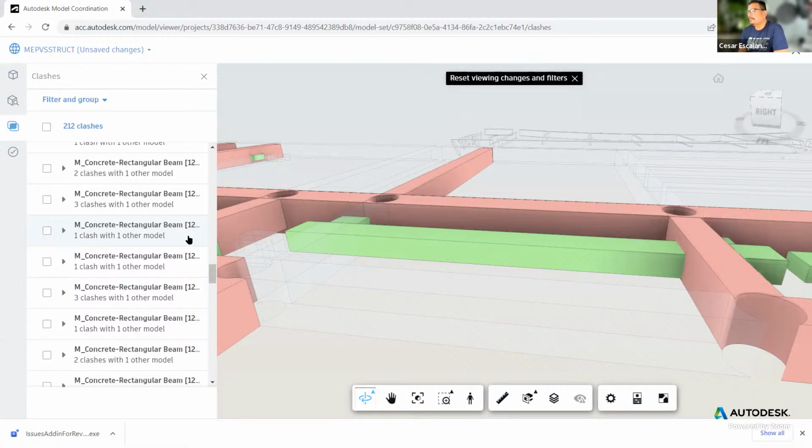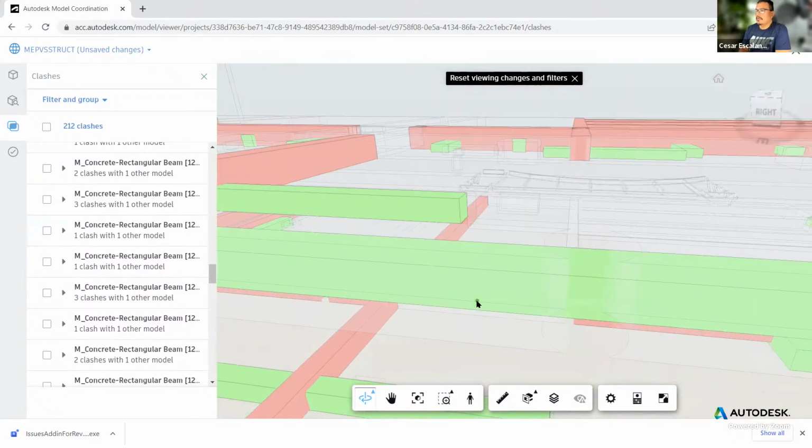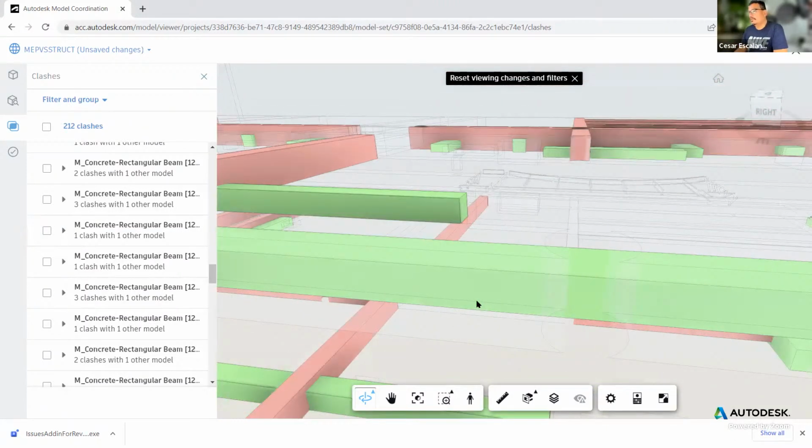Or if it's assumed that the vertical penetration through slab is going to be taken care of by the contractor, and you don't address that now, then you can ignore those as well, etc. The BIM coordinator or the 3D coordinator will start assembling issues and use those issues as topics for discussion during the 3D coordination meetings.